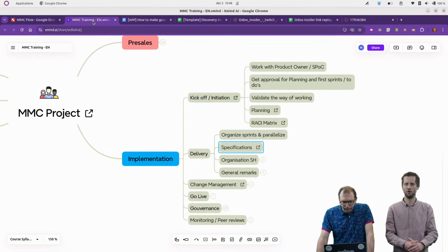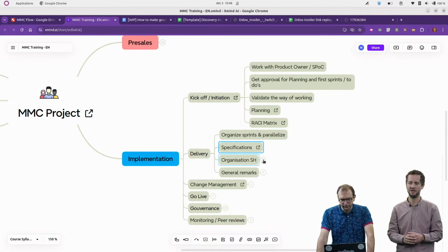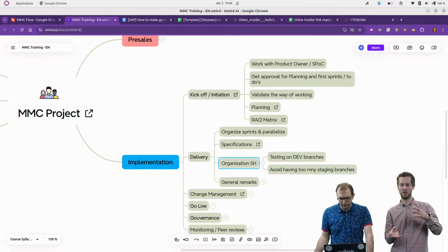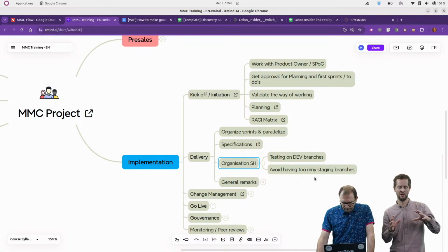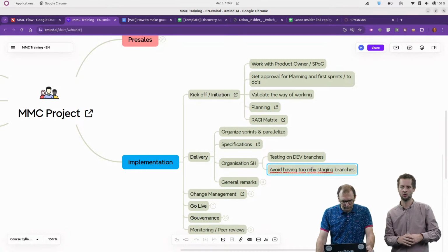Yeah. And here the focus on the specification is also to make something quite big, so we can give, I would say, a significant amount of work to the developer. We try to have one specification, one Excalidraw row, per screen or flow.